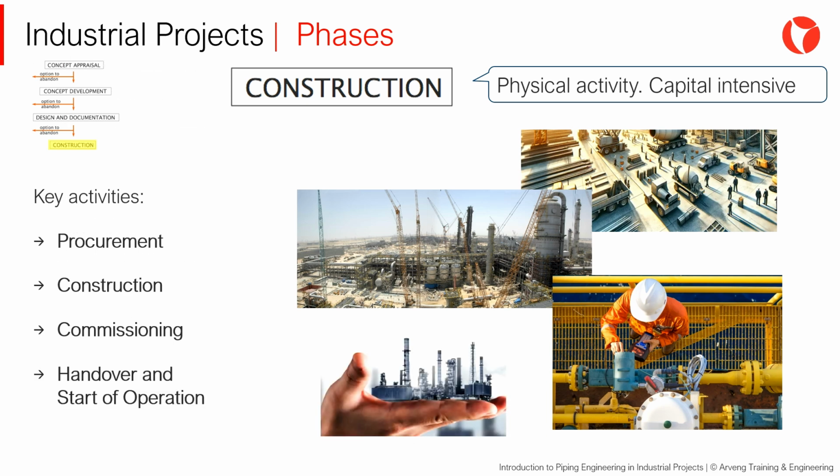Handover to the owner-operator. This final step includes the transfer of the facility to its owner or operator, followed by plant startup. It involves both highly technical aspects, such as hydrostatic testing of pipelines, and critical legal requirements, including insurance certificates and state registrations.